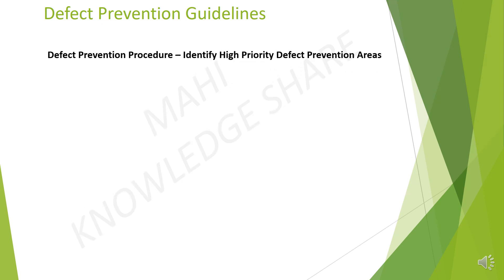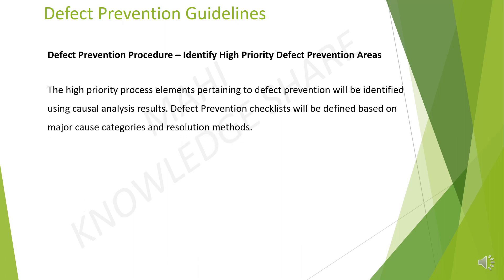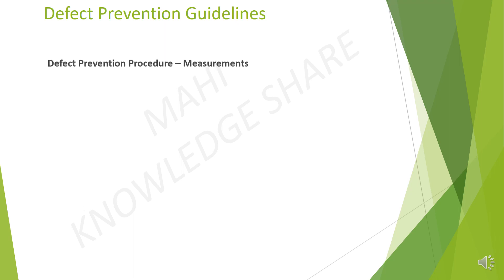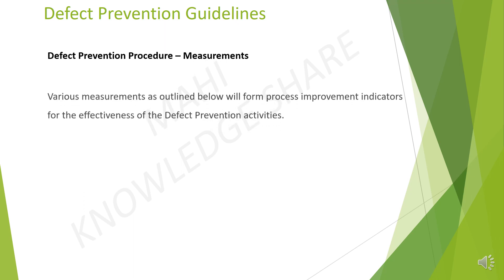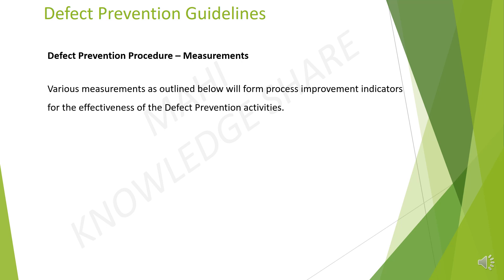Step 3: Identify high priority defect prevention areas. The high priority process elements pertaining to defect prevention will be identified using causal analysis results. The defect prevention checklist will be defined based on major cost categories and resolution methods. Step 4: Measurements. Various measurements, as outlined below, will form process improvement indicators for the effectiveness of defect prevention activities. Process and product metric trends.